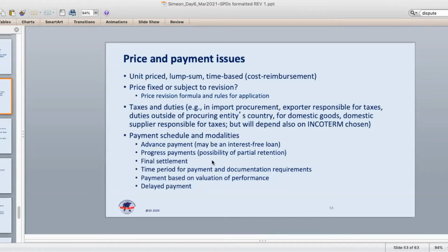I expect from you how to adjust that part. Thank you. Well, if there has been a measurable reduction in the level of effort, then it should be possible to agree on the cost basis for measuring the level of effort, and come to an agreement on a reasonable adjustment in the price. But this is not something that would be dealt with in the price adjustment clause.